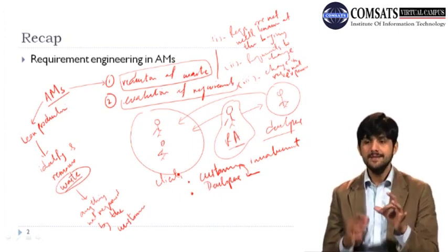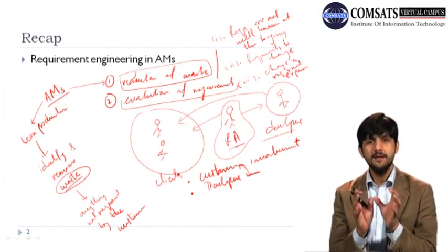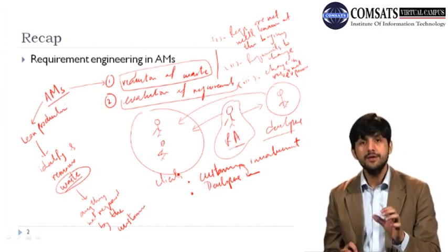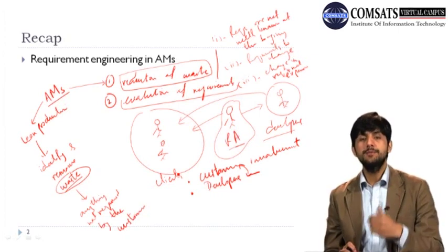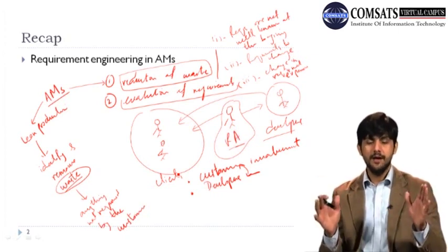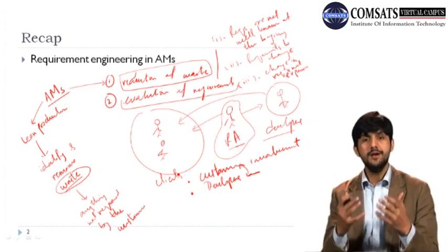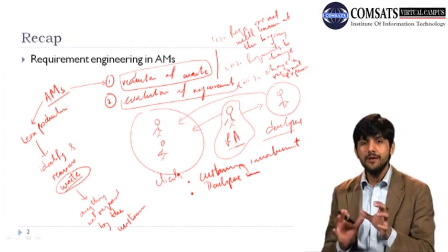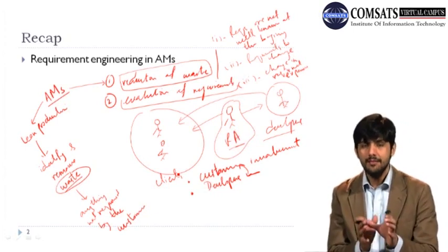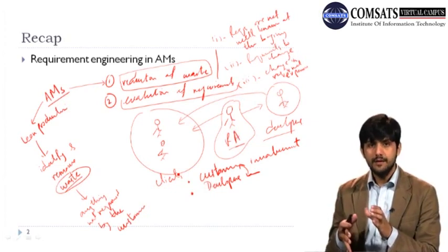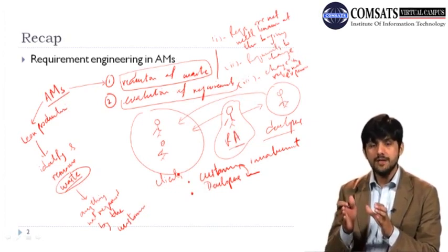So we are splitting requirements into small iterations, and before every iteration we do requirements prioritization. We prioritize our set of requirements before each iteration. That means our pool of requirements is up to date at all times, and we are exactly doing what the client wants, and not wasting our time on something the client does not want.